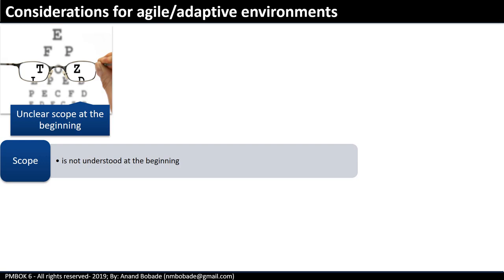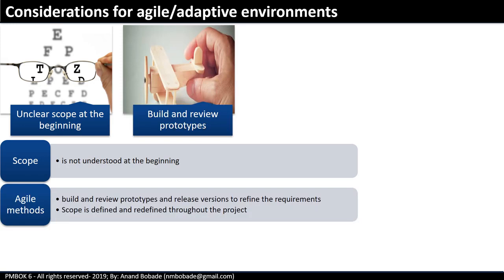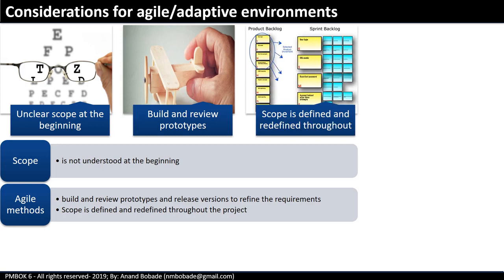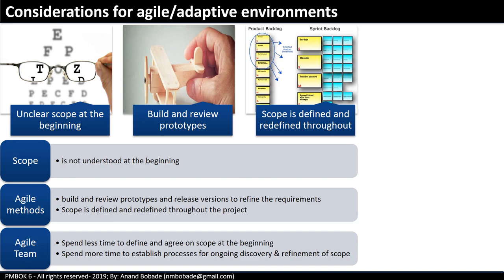Regarding considerations for agile and adaptive environments: agile projects will mostly have unclear scope at the beginning. Sometimes the business doesn't know the product requirements — they might say 'we want to develop the best TV in the market,' but what does that mean exactly? The project team may build a prototype to develop product understanding. Agile cycles, referred to as sprints, are executed to refine the product until it meets the customer's requirements. Scope is defined and redefined throughout the project lifecycle. Agile teams spend less time defining and agreeing on scope at the beginning, but spend a lot more time on it as an ongoing activity as part of discovery and refinement during each sprint or iteration.